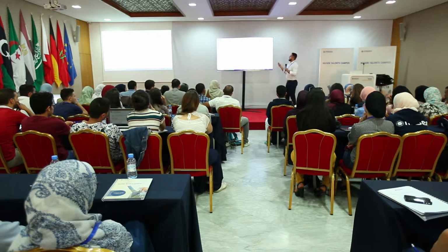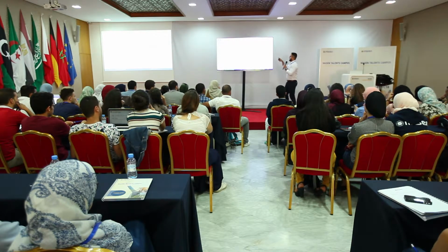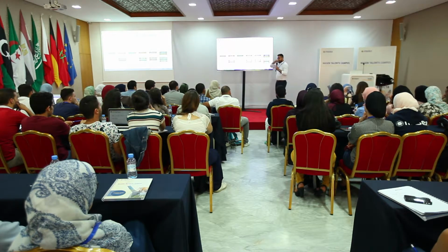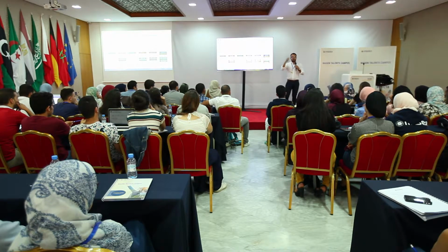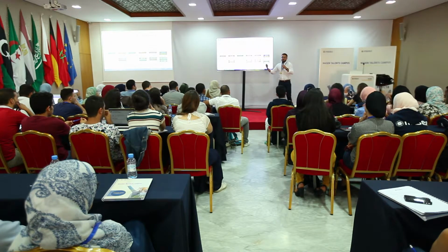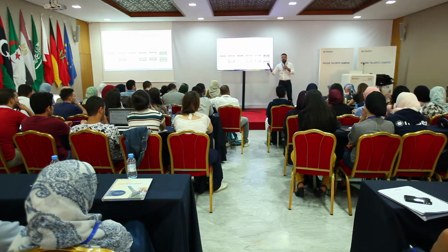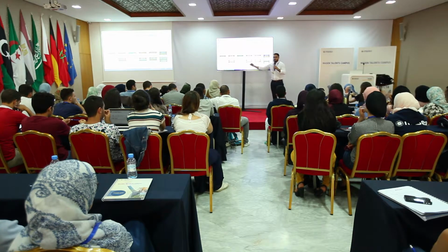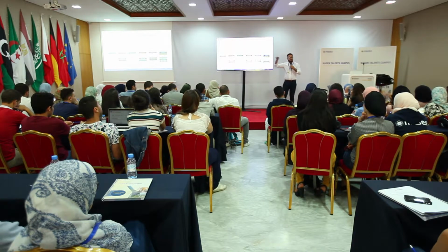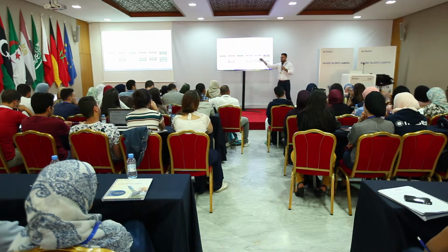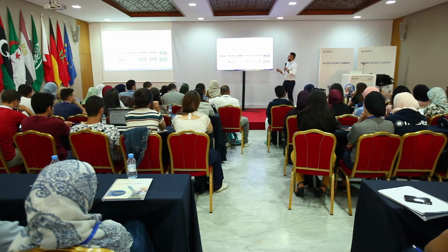So to do that, you need to know location-specific data. You need to build cost models for that location. It's not the same to buy something here than in China, or vice versa. To consider labor costs here than in China, or vice versa. And to set input limits for the optimization problem, because if you're optimizing, of course, you need to provide boundaries for what you are optimizing with regards to.